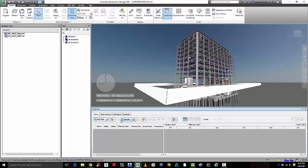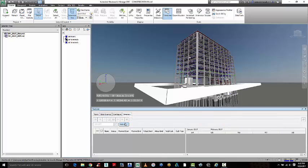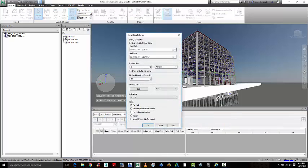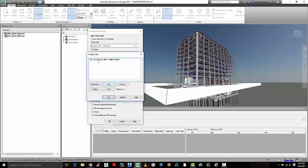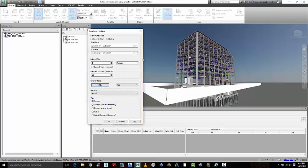You can set this up to auto attach to the geometry of the building and then run a construction simulation, and with that construction simulation you can start to look at the different dates and times things start and finish. You can also add more information about date and time, costs, extras as needed to see how your construction program is progressing in a 3D environment.